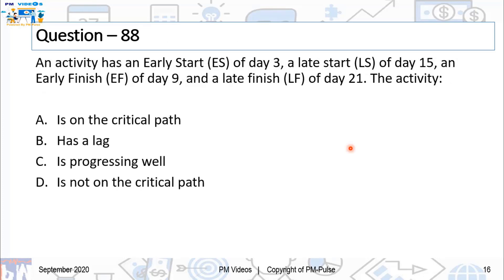Question number 88. An activity has an early start ES of day 3, a late start LS of day 15, an early finish EF of day 9, and a late finish LF of day 21. The activity: A, is on the critical path. B, has a lag. C, is progressing well. D, is not on critical path.